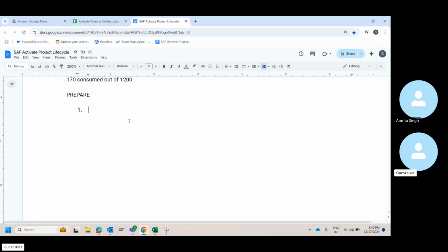So when we talk about prepare, at the end of the discover phase, your sales team will hand over the project to the PMO. Your PMO has the project now, and the PMO will assign a project manager to the project. Now assume that it's you.